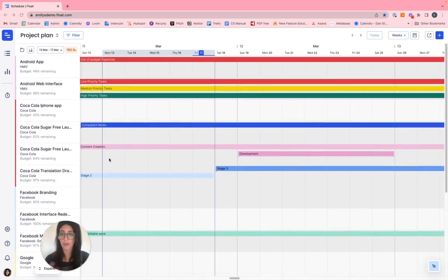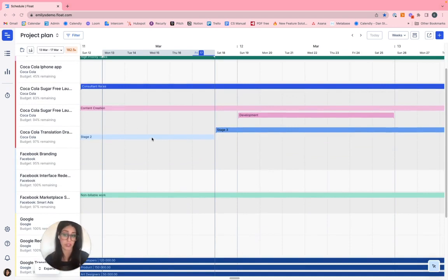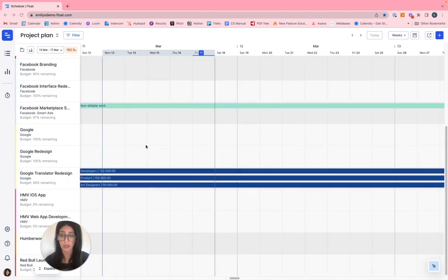Scrolling down, there are different reasons why clients may use phases. It could be to capture all of the out-of-budget expenses. It could be to prioritize tasks within an overarching project. It could be to break up the project into more digestible or manageable pieces. Alternatively, some clients set a repeating monthly retainer for a project by creating a new phase each month. Then they use the hours by phase or fee by phase to have unique budgets. Phases and their budgets are displayed on the chart in the project view of your reports and the table beneath.